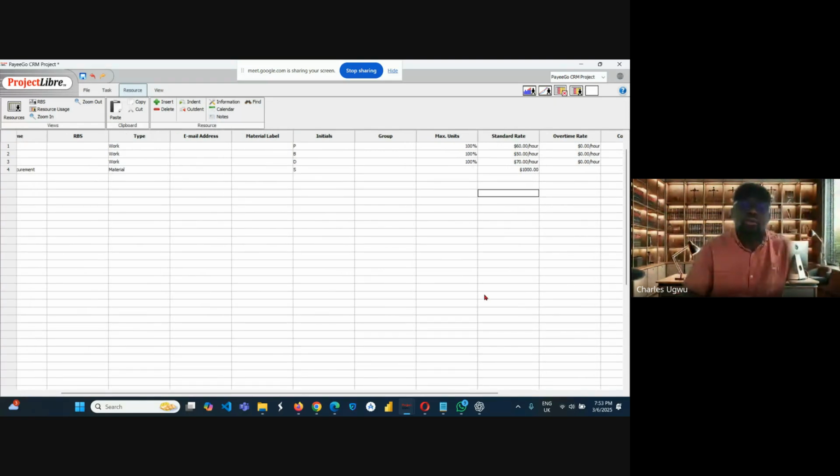So we're going to go with the standard rates, and everybody here is going to be available 100%. If some people are working part-time, for instance, some people can be available just twice a week, we can give it maybe 20%, or you work out the percentage they are going to be available.